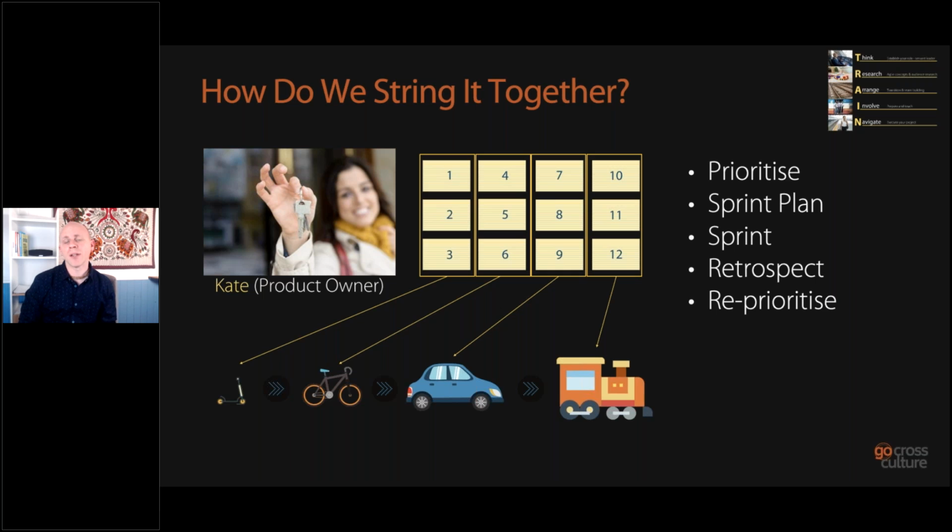And what you can do, as an exercise, but communicate this, is say, actually, after 3 sprints, we have got a sense of where we're headed with this product, and we understand how quickly the development team can build stuff, because in 3 sprints we can see the speed of how they can deliver.